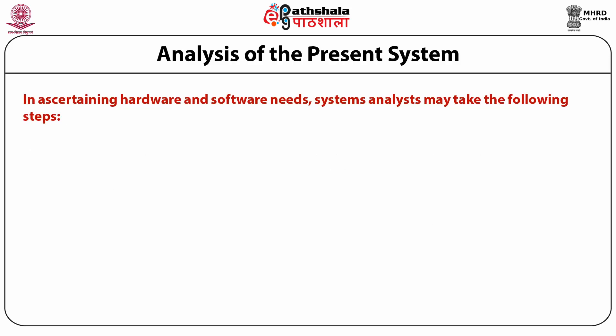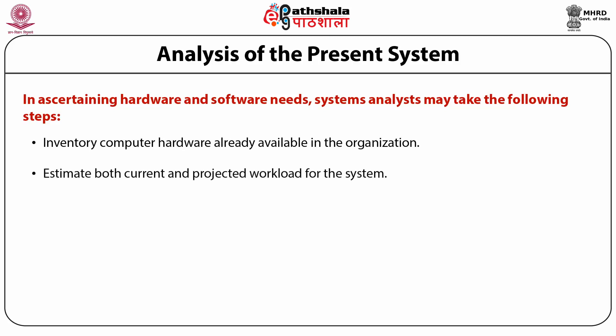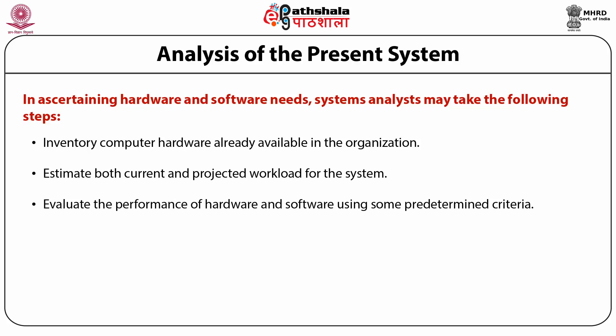In asserting hardware and software needs, system analysts may take the following steps: first, inventory the computer hardware already available in the organization; second, estimate the current and projected workload of the system; third, evaluate the performance of the hardware and software using predetermined criteria; then choose the vendor according to the evaluation plan; and finally, proceed with acquisition of hardware and software from the selected vendor.